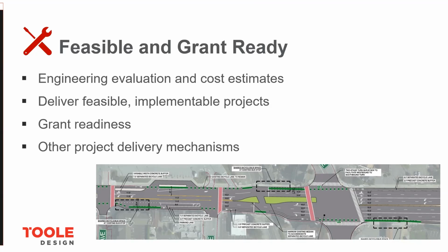So the lead agency should have other methods identified as well to get projects on the ground faster. Some of the techniques that I've recommended for local agencies is to look at their capital improvement program. Are there some quick, fast, ready projects that can be identified and implemented if there's some roadway repaving going on? That's a quick technique to really get projects on the ground.